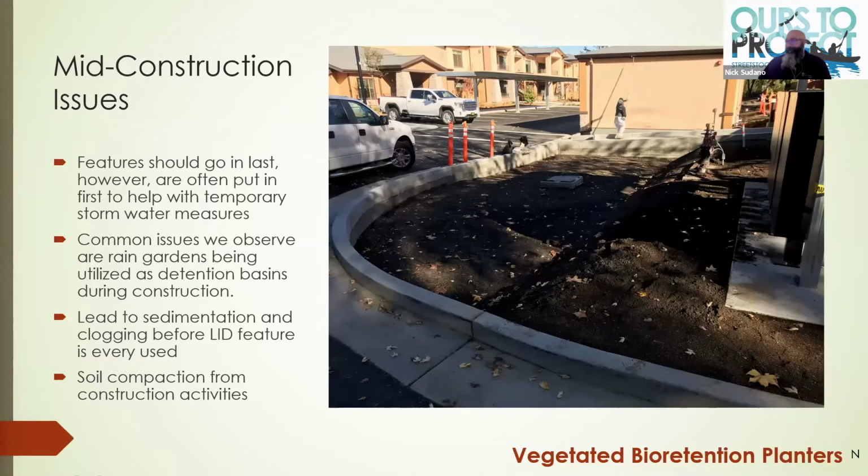You're totally good. So let's talk about mid-construction issues, right? A lot of times you're doing construction in phases. You want to sell homes. You want the landscape features in there so you can sell and have people occupy. Sometimes that's to the greatest detriment of these features. We do not want to see these areas getting compacted. We do not want to see these areas being used as detention basins.